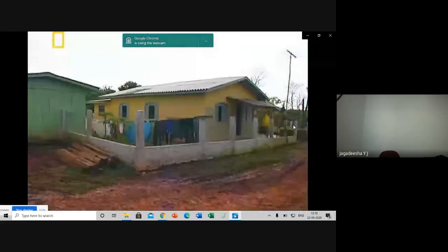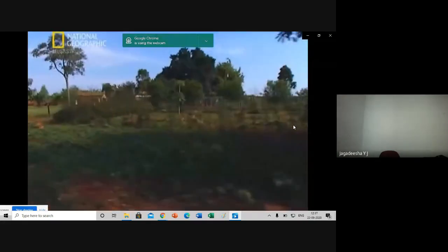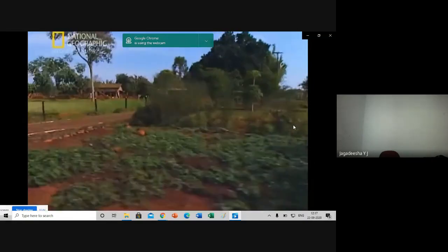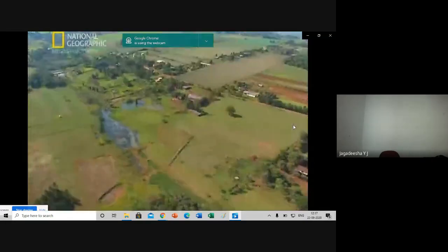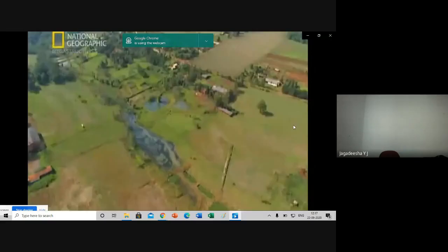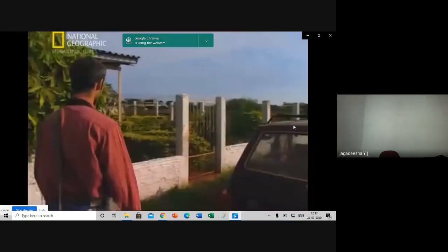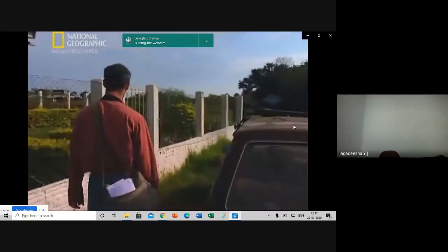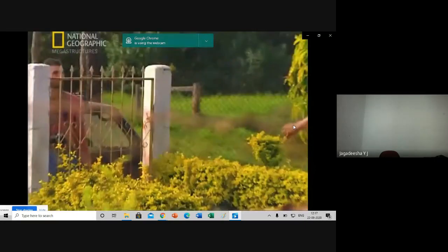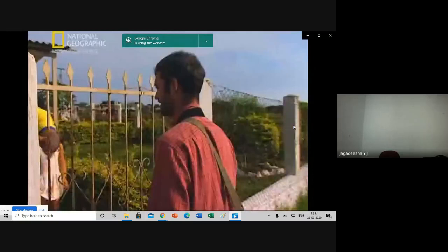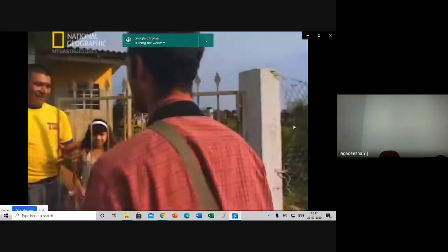And that meant embarking on one of the world's biggest ever real estate valuations. First, the whole area was photographed from the air. But that didn't give enough information to calculate compensation. To get more detail, the valuers had to send an army of photographers on foot to scour every square meter of the Piranha Valley.